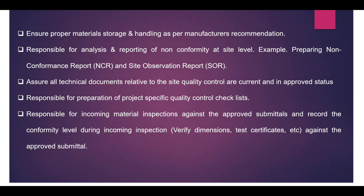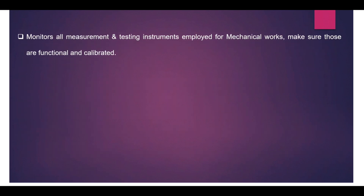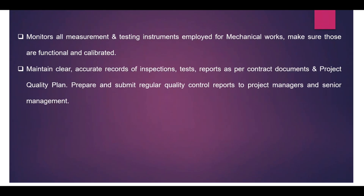Once you receive material on site, verify dimensions and all test certificates against the approved material submittal. Also monitor all measuring and testing instruments used for mechanical works to ensure they are functional and properly calibrated. On site, if an instrument is used to measure dimensions, proper calibration records must be maintained within the quality documents to get accurate results — and during auditing, calibration records will be verified. Maintain clear and accurate records of inspection and test reports as per contract documents and the project quality plan.